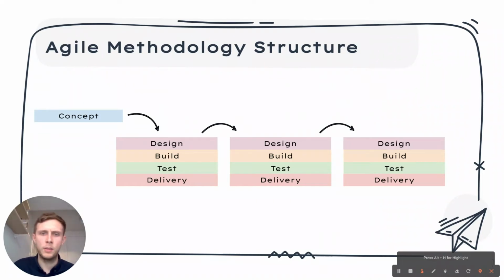Let's imagine that we're building a piece of software, we're building a website. That website's got 10 pages, and each of those pages is completely unique. They've got their own setup, their own configuration. Rather than delivering our whole website together and taking a while to get to that point, we can actually design, build, test, and then deliver and put live each of our website pages in turn.